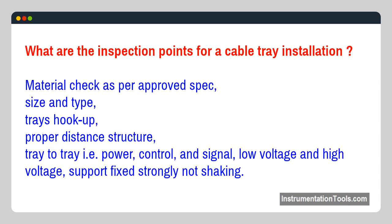What are the inspection points for cable tray installation? Material check as per approved spec, size and type, trays hookup, proper distance structure, tray to tray (i.e., power, control, and signal), low voltage and high voltage separation, and support fixed strongly — not shaking.